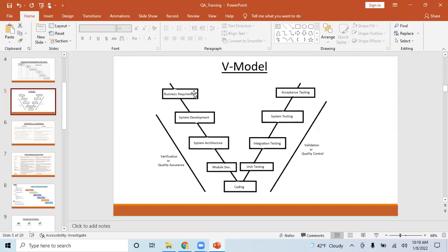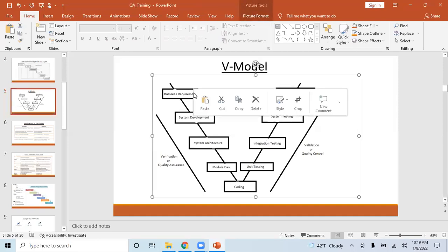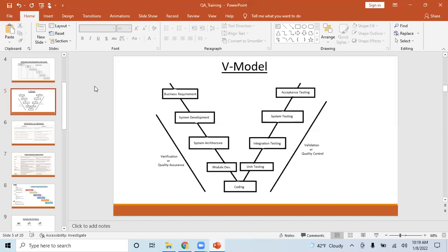And if there is no acceptance criteria, tomorrow a customer or somebody will raise a bug telling that, hey, you don't have Apple Pay or Google Pay. So then the developer will say, hey, in the business requirement, it is not there. The acceptance criteria only says 4 types: Discover, American Express, Visa, Master. So I have implemented only these payment gateways. That is why I have not implemented Apple Pay or Google Pay.